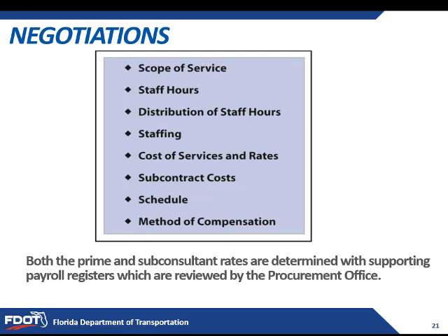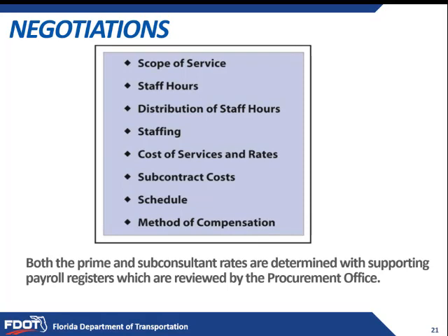Staffing. Addition to or the elimination of selected staff members is a negotiable issue. Considerations can be based off of the location of the staff member to the project. Cost of services and rates, and this includes salaries, salary escalation, direct expense, and overhead. These are non-negotiable items.